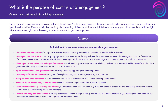I would also always say if you've got a communications plan that's fairly big — it might be a Microsoft Project plan or something — have a one-page summary version that just looks out over broad time frames and gives a sense of what the messages will be. So senior stakeholders who ask what's going on with comms have something to show them and can take comfort in what's going on.